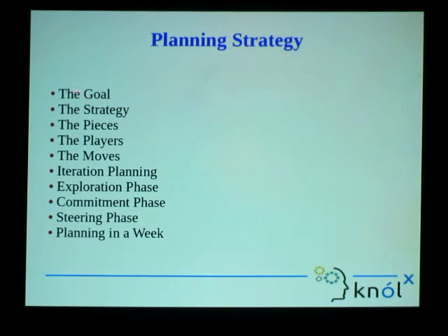Strategy is dependent on the goal. Keeping in mind what exactly the goal for the release cycle is, we plan our strategy. For example, the strategy might include hiring new people or getting more resources or hardware, and creating tasks or stories on Jira or Pivotal Tracker. It might also include training the team on the particular technology we are going to use in the next release cycle. So the strategy includes all those factors or requirements that are needed to make this release cycle successful, that is, achieving the goal we defined earlier.